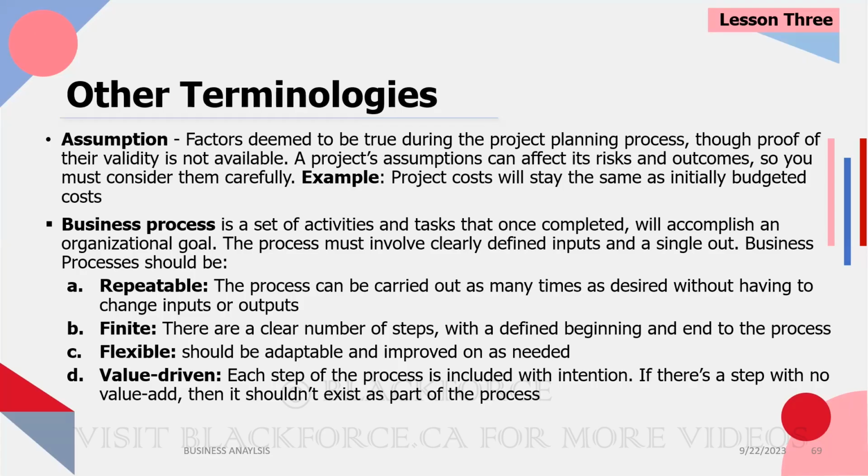This project is going to last us 3 years, and we're going to need a BA all 3 years. We're hiring a BA in year 1 for 120,000, and then we've assumed that year 2 and year 3 will be 120,000 as well. That's not necessarily true. Even your current BA can ask for a pay increase, but your current BA might leave, and the next BA you find is going to be asking for 20% more than your previous BA.